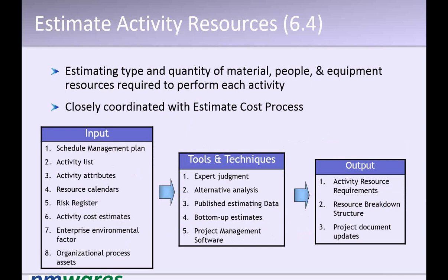In such cases, I go with the industry or company-wide data which is made available, which is published by other companies or within the company also. So I rely on the published data because I don't have any experience, neither do I have any data which can help me to estimate. The bottom up estimates talk about estimating at the activity level and then summing up at the higher level.